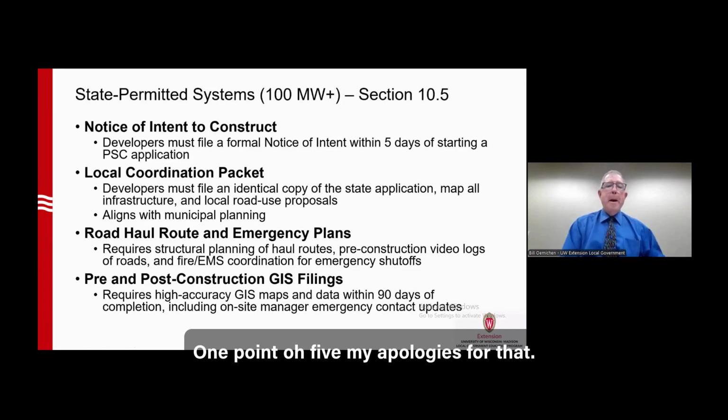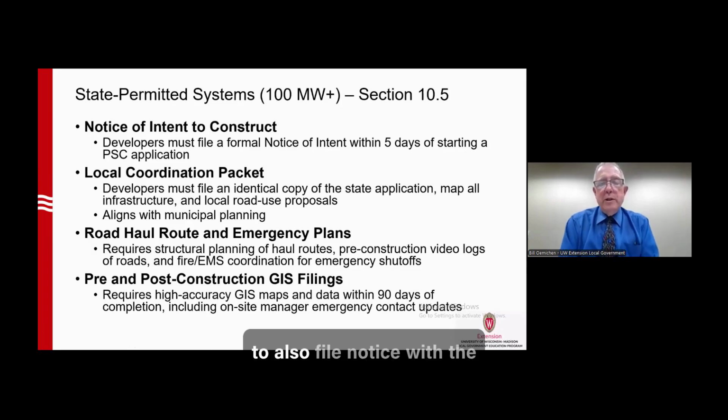My apologies for that. But the developer, at the time that they are putting the application into the Public Service Commission, is required under the PSC process to also file notice with the local units of government. This makes it very formal and very clear that the local ordinance requires a notice of intent to construct. The notice must be filed within 5 days of starting a PSC application. So if that PSC application goes in, then within 5 days, there has to be a formal notice to the local unit of government.